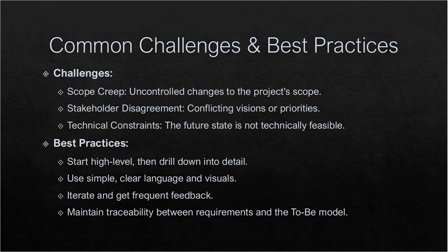And the best practices: start high level, then drill down into the details. Use simple, clear language and visuals to get understanding. Be iterative and get frequent feedback from the clients. And maintain traceability between the requirements and the to-be models, so you can understand what the exact requirements are and what we cover in the to-be documents. You should also have the link between the current or old processes in the system and the future processes in the to-be system. So that should be there.